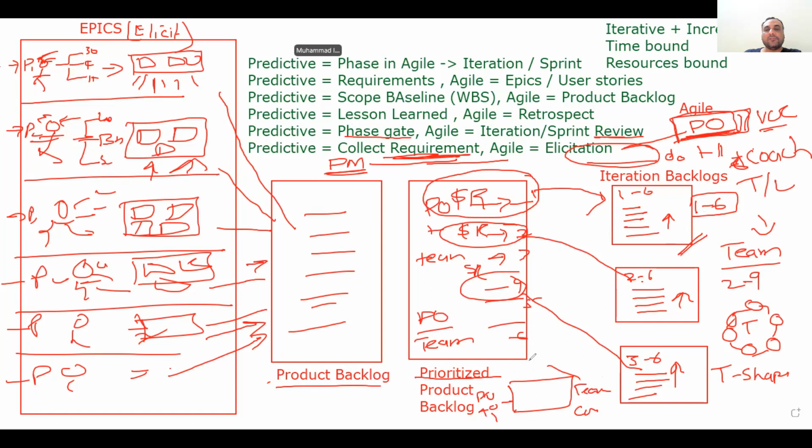They demonstrate the deliverable. If they like it and approve it, it will be shipped. If they don't like it, we take these new requirements and put them again in the product backlog. Then the product backlog will be reprioritized, and the team will start a new sprint, take a user story and decompose it. This continues throughout the project until you achieve the value.